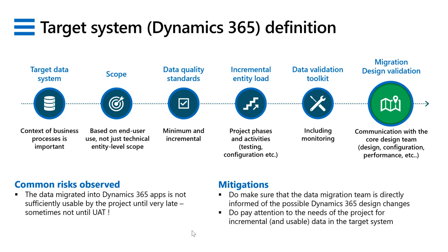And that's important because, again, you can waste a lot of your own time as a data migration team putting data over that is not meeting minimum requirements. And you can waste time of the project, where they're getting stuck and they're finding errors because the data is not good enough to transact on. Right? So set those minimum standards, be explicit. It's okay if they're incremental, that you are expected to, for example, with a customer record, get deeper and deeper as you go through the cycles, but make sure it meets some minimum bar and it's not arbitrary, right? That it's meaningful in the target system.